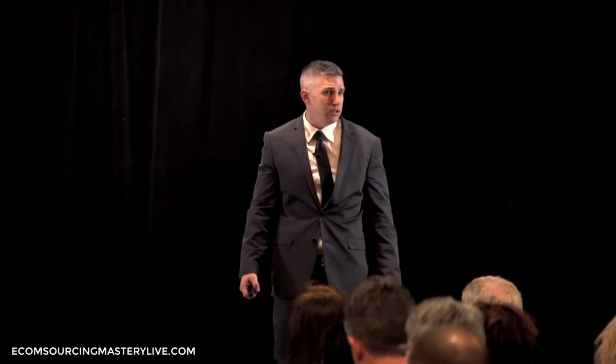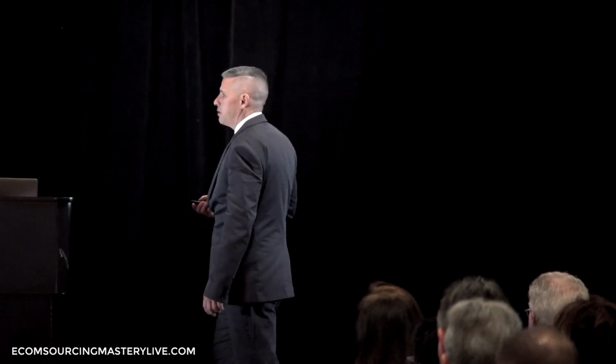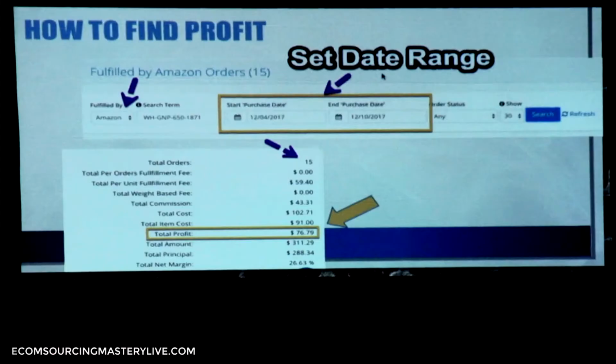Sometimes they check it in really fast, and sometimes they're really slow. I always err on the side of caution and say it's going to take them longer than shorter, right? Because I want to not run out of stock. I'd rather buy a little bit early than a little bit late. Make sense, guys? So calculate longer lead times. I use pretty much by default 30 days. Even if I know it's going to get in there in 21, I'm still calculating 30. Some of our suppliers are so fast. We have one that we buy from, and the next day it's in our warehouse. Same day delivery.